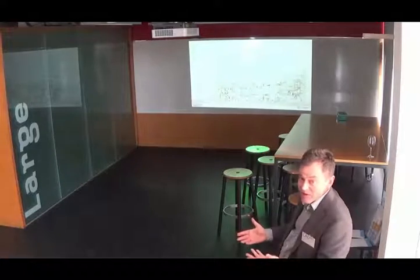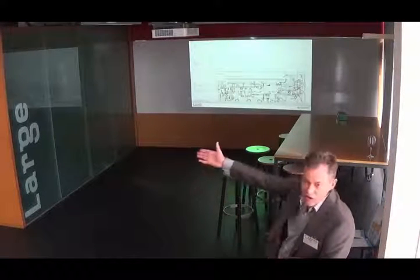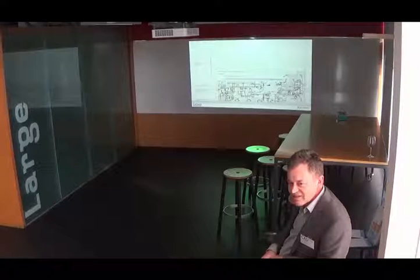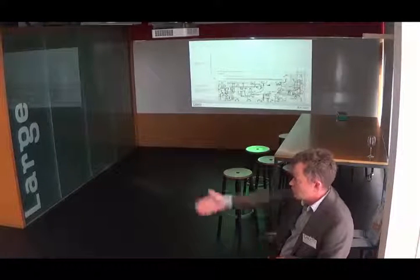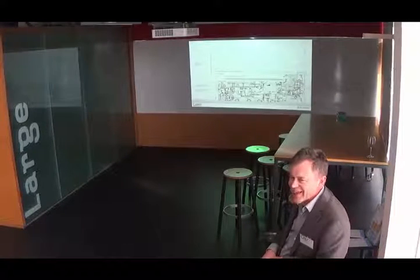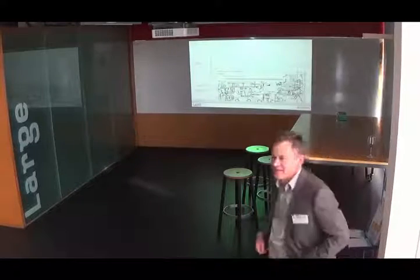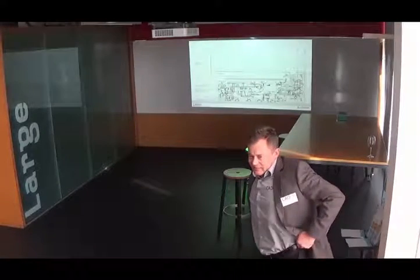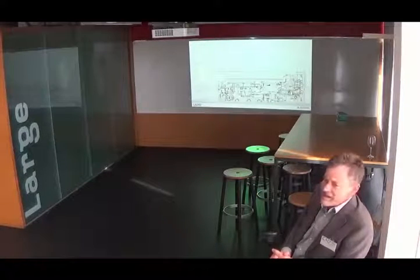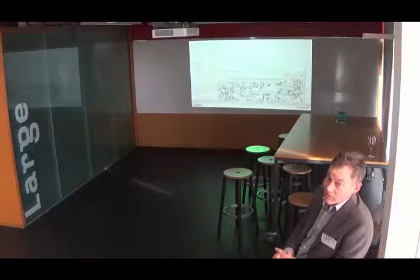Anyone want to disagree with that? Aren't there issues of liability and stuff like that? We're giving a file to quote from, so why not just... But if the file is wrong and you quote it, who pays for the equipment? What it's saying with the drawing though? Well, the drawing's got more judgment in it. I'm just being devil's advocate. Yeah. We tell the fabricator to verify, which they do. And then there's a 3D model, so it makes it a lot easier to verify. And once they're happy, they take quantities off of it. So they take responsibility for it. They certainly find errors in them.